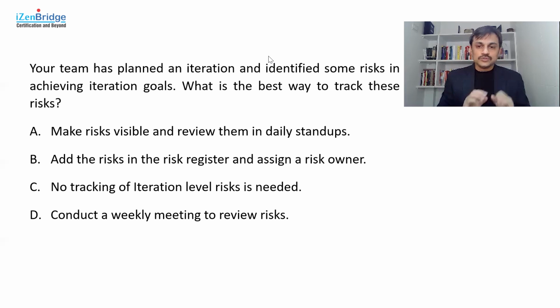So the best place to talk about these risks is the daily stand-up. Maybe while you are concluding your daily stand-up, you need to review: is there any risk which can derail our plan? And if it is true, then we should plan differently for our upcoming 24 hours. You can put them into your tracking board, risk board, whatever you are using. Before you conclude the daily stand-up, you may review them. You can read from my explanation, option A looks the most appropriate here.